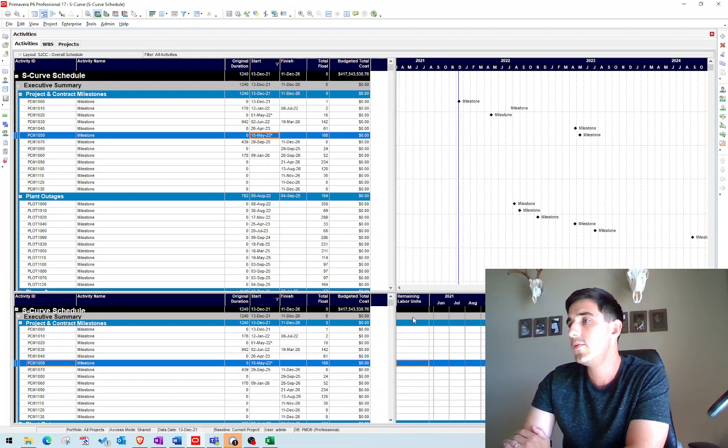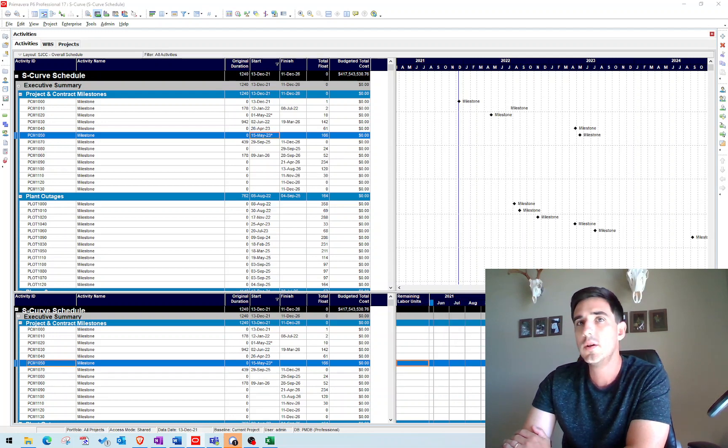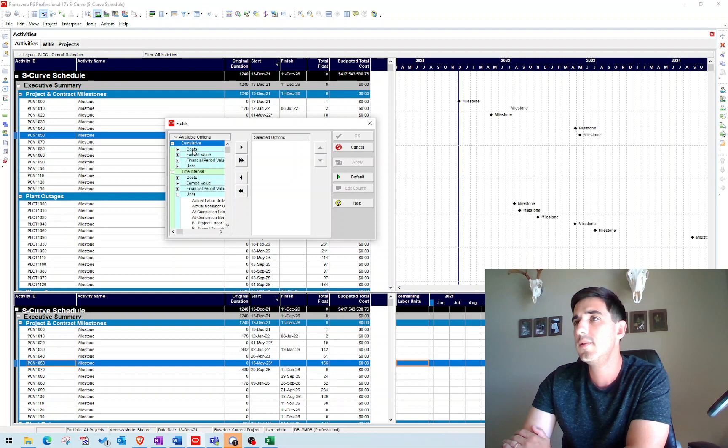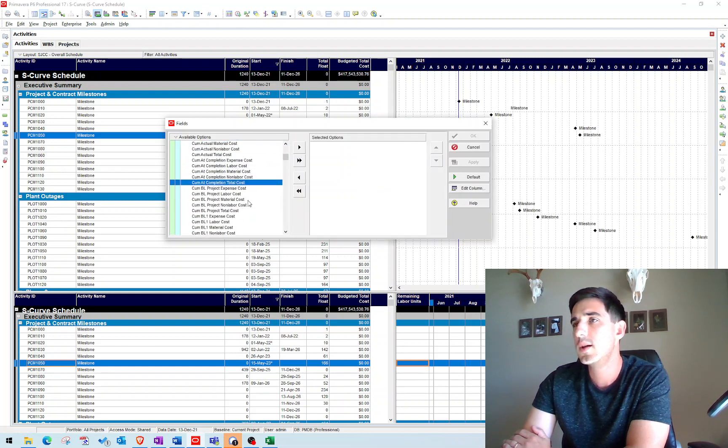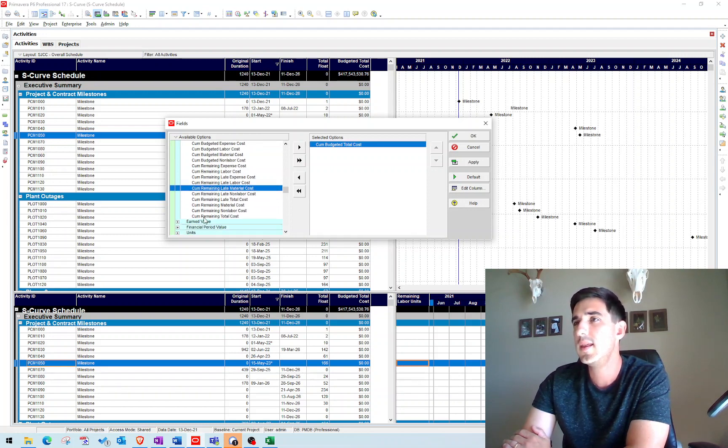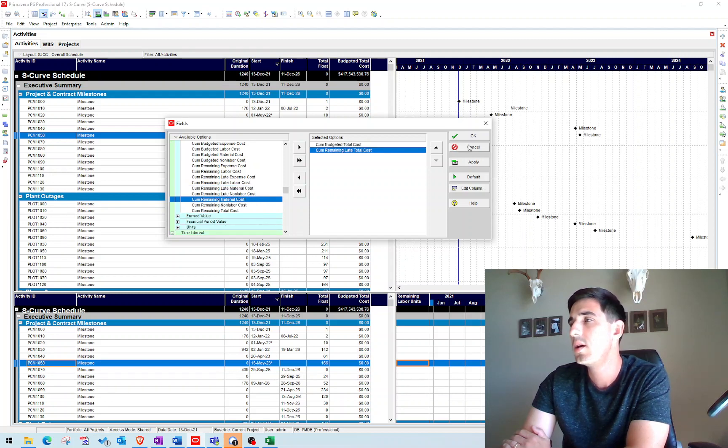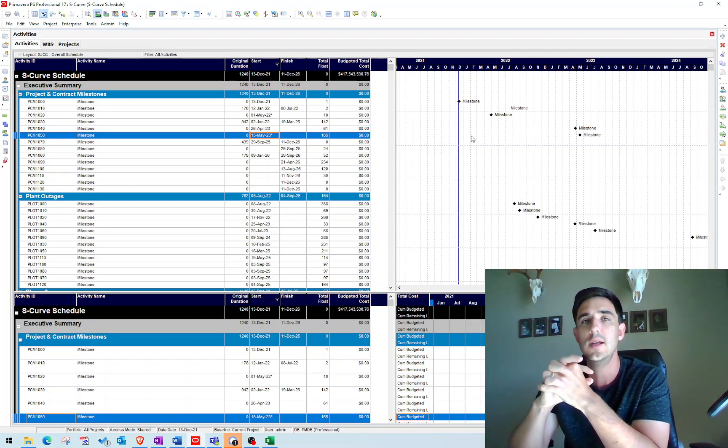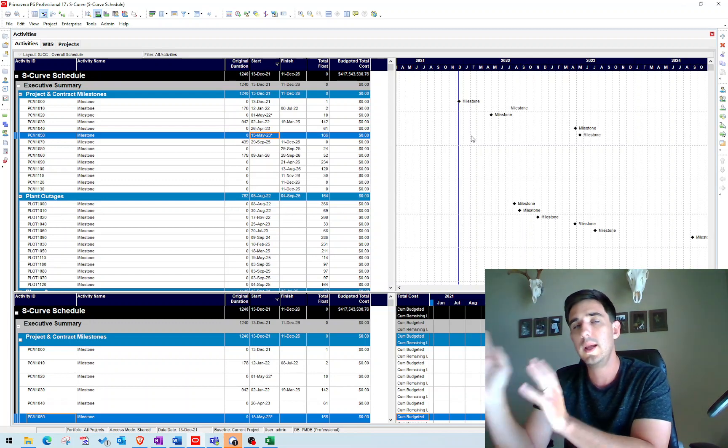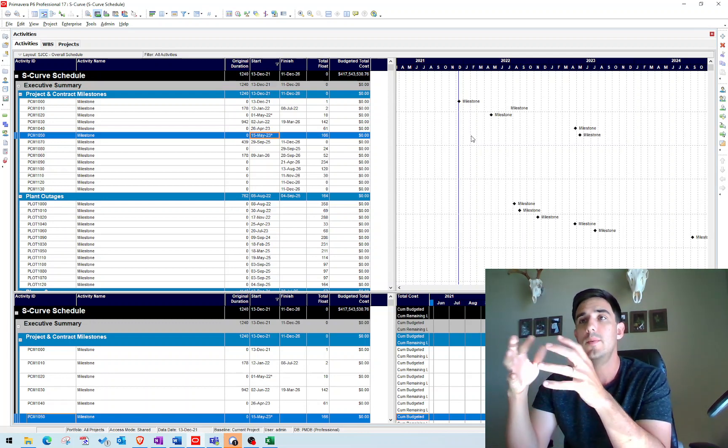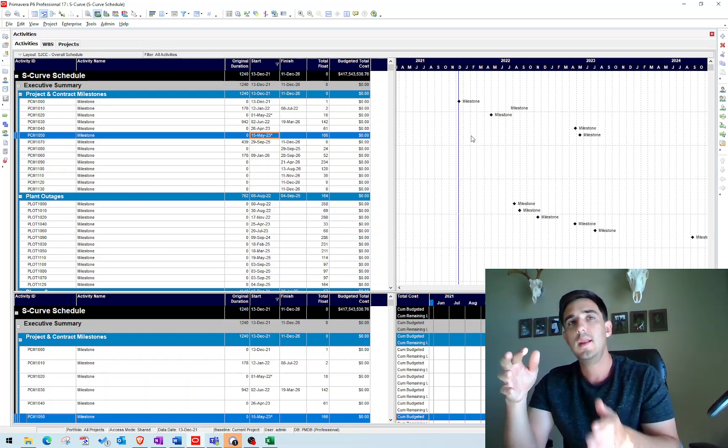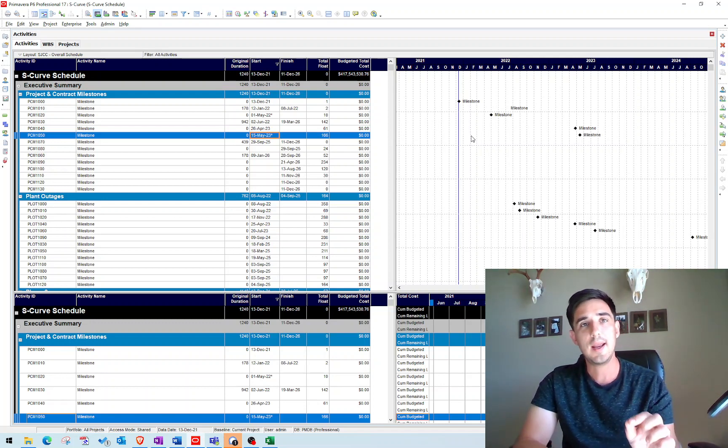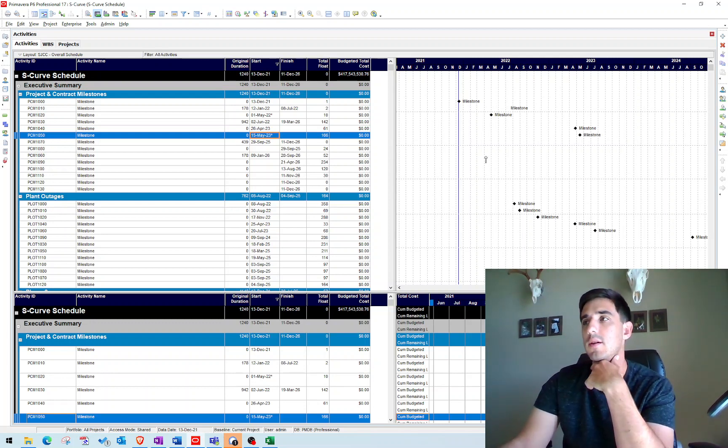And then the two values down here that we want, make sure that you right-click here. Yours might say remaining labor units, but we're going to go to spreadsheet fields. Instead of remaining labor units, we don't want that. We want to go to cumulative costs. Let me expand this a little more so you can see. The two numbers that we want are the cumulative budgeted total cost and the cumulative remaining late total cost. And again, I don't think I said it in the beginning. The schedule that you want to use for this exercise to establish your early and late curve is your baseline schedule. You don't necessarily want to be doing it later on to a schedule update. You use the baseline schedule, and that generates your early and late curve. And then throughout each update period, you're never changing the early and the late curve. You're only adding to the actual cost curve, and you're just plotting that actual cost curve as you go along.